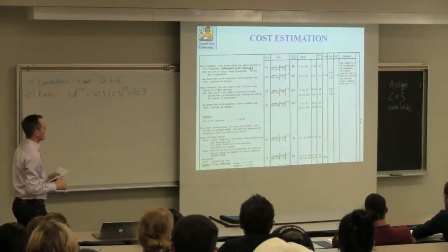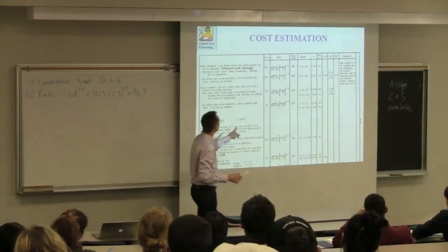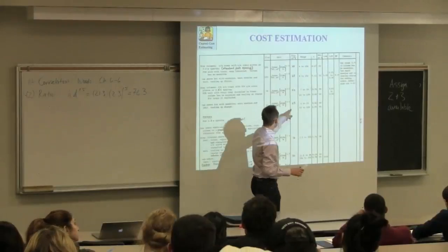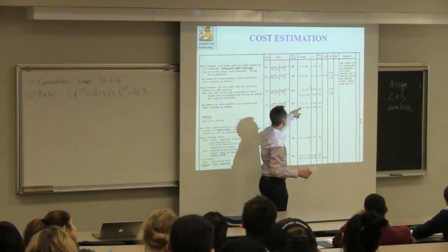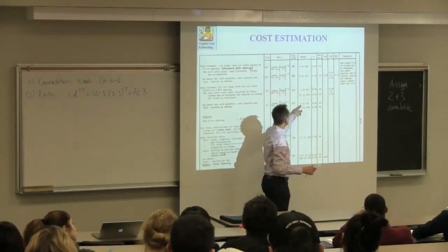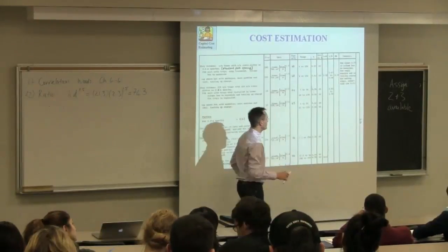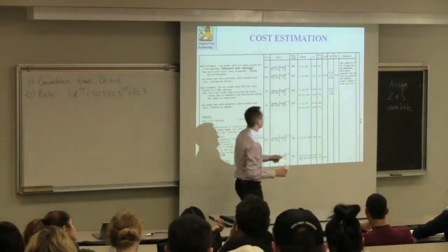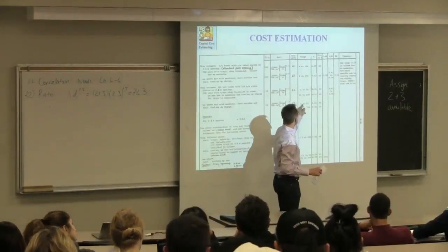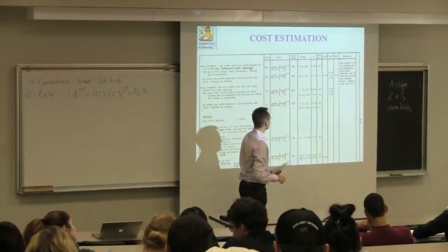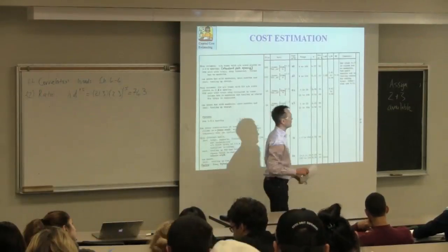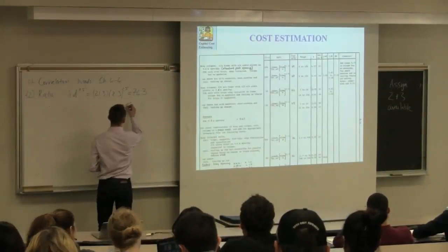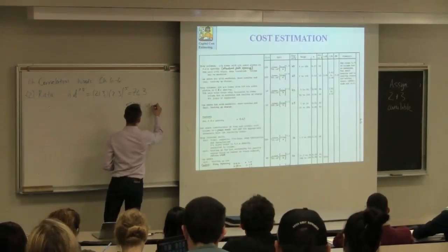So if we look at the base tower in this table, the base tower is for a value of 22 of that product. The cost of that tower would be $65,000, and that ratio is valid between 5 and 22, with an exponent of 0.52. And if that ratio is between 22 and 100, you have to use a different exponent of 0.96. So it just depends where our ratio is that our exponent changes. The error, however, is the same for both instances. In this case, we get a value of 74.3, which is less than 100. So it's valid.